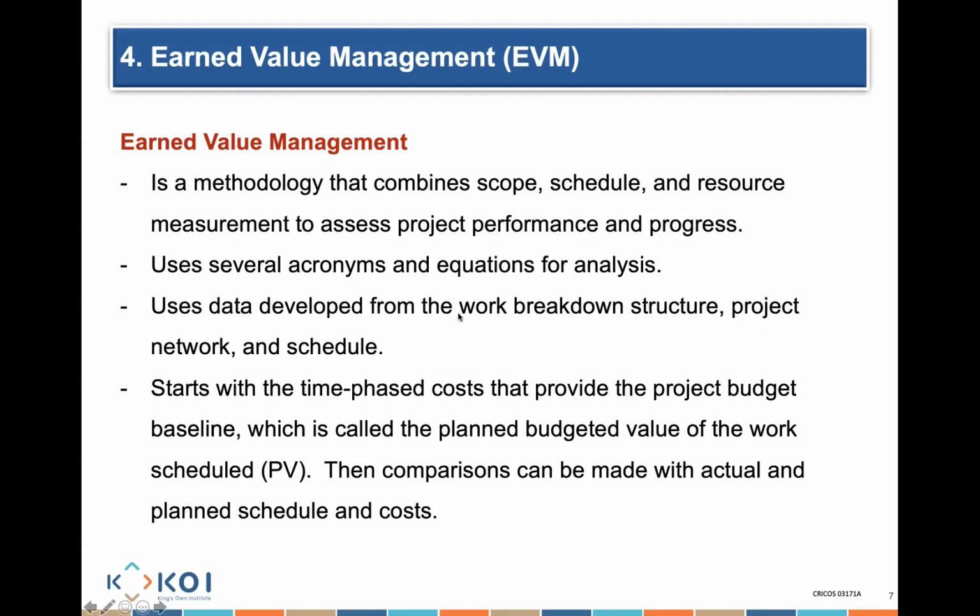Okay. Earned value minus actual cost. Yeah, that's called what? Cost variance. Cost variance. And what's the other one I can use? Earned value divided. Yeah, continue. But what is it called? It's called something. Cost performance index. Performance index, yeah. Equals earned value divided by what? Actual cost. Actual cost. So I've put that for you guys in the chat. And if I want to compare how I'm actually performing in terms of schedule, what can I calculate?